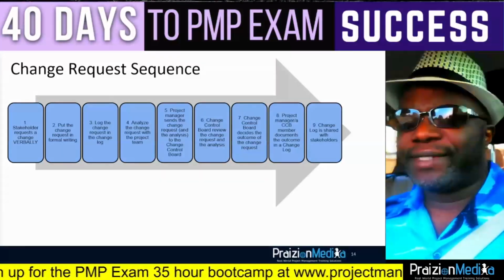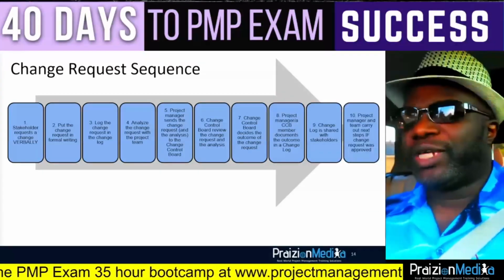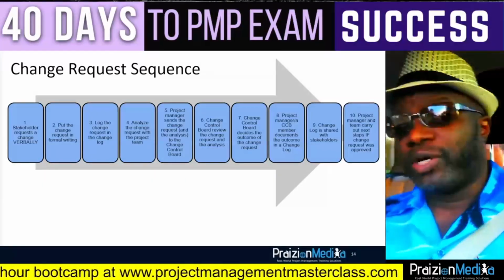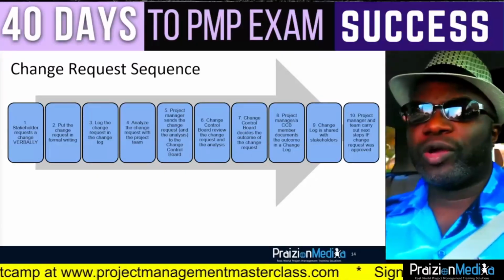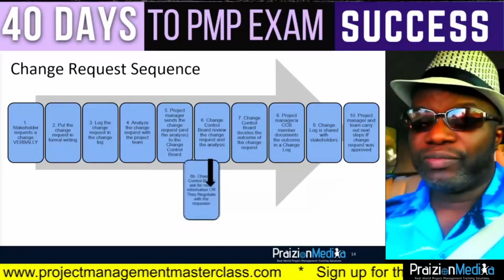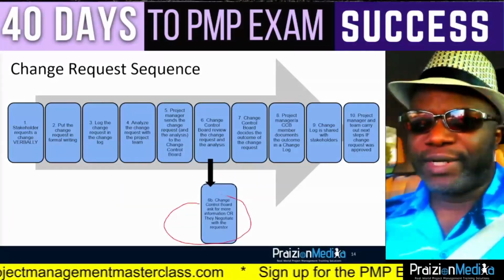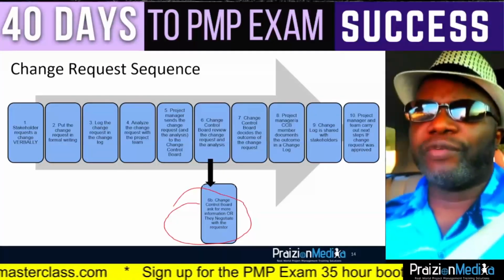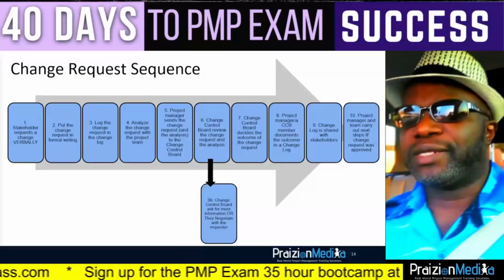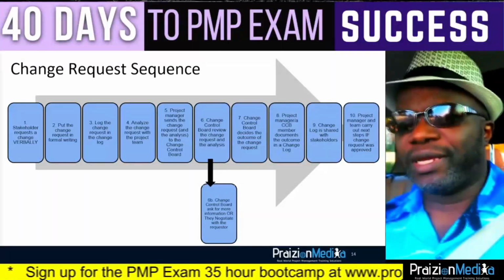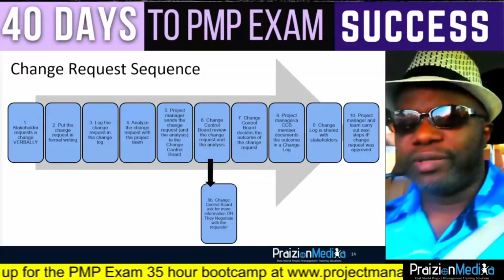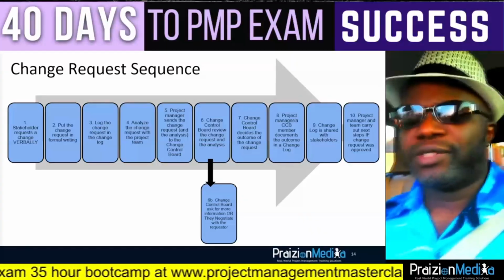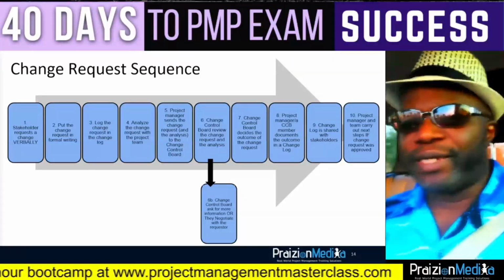Also be aware that the change control board, or even the project manager, at any time could request additional information from whoever the requester is. At the same time, they could offer something different. They could say, we can't give you what you're asking, but we can give you option B. So that could also happen in change management.